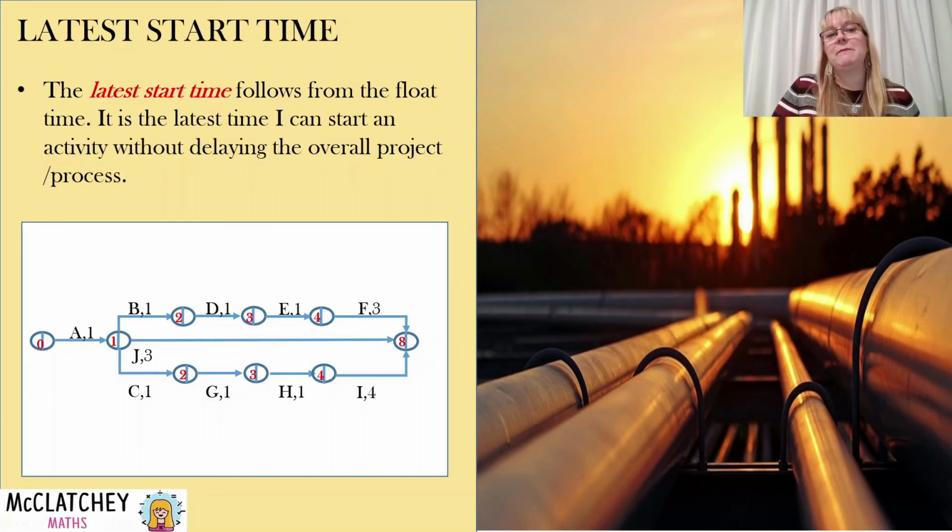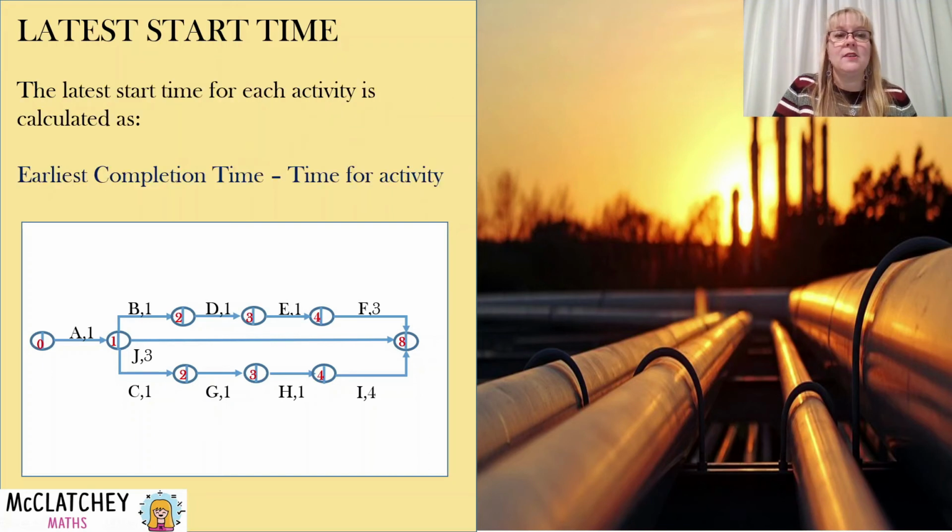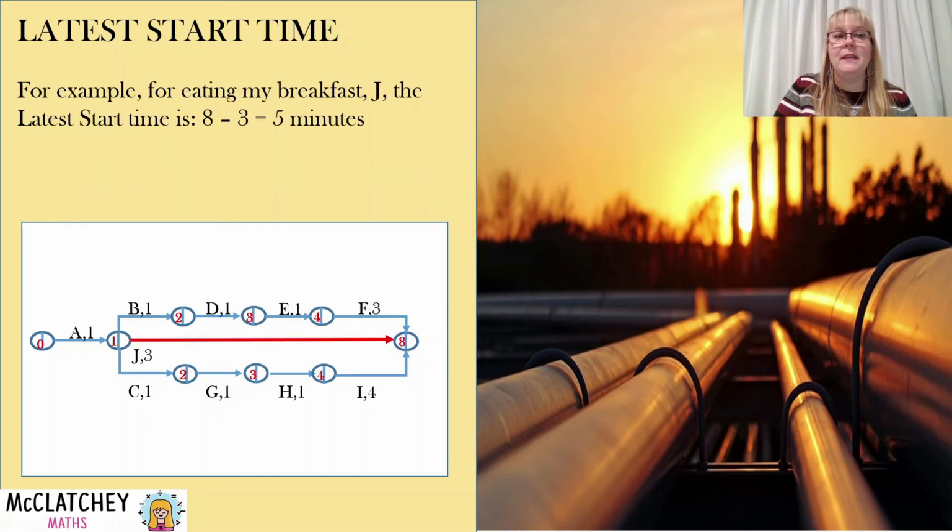Now I'm going to talk to you about something called the latest start time. So this is the latest I could start a particular activity without delaying the whole project completely. So these are also following on from our idea of float time. The only activities that have a later start time are the ones on that critical path. So a little formula to do that is to look at the earliest completion time and take the activity time away from it. So for example, let's look at eating breakfast again.